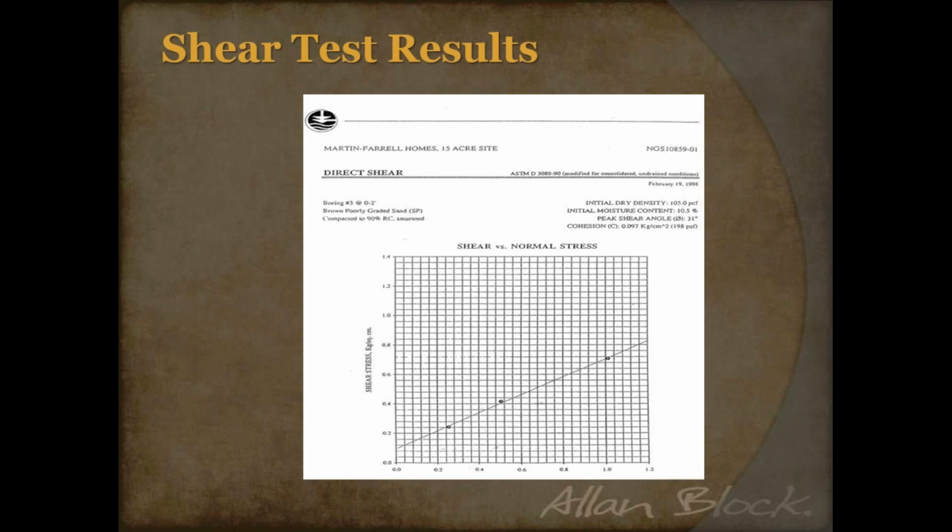And if the design team is all up front, these can be budgeted as part of the scope of work for the engineering, as opposed to, I know some of you guys work for the contractor. That means you got to go back and ask for the test after the project's been bid, and that can be problematic because the timing doesn't work for you, and neither does the scope work for you.